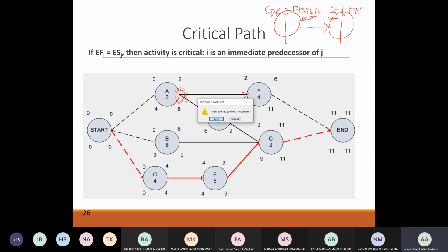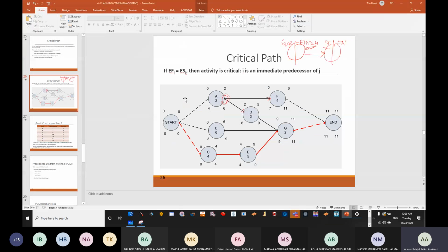So once again, there are two disadvantages of the ADM. One, that it does not allow you to have the gaps and overlaps, which is artificial, that we talked about for the weekend and the holidays, and that has been taken in the BDM, so it's an advantage for the BDM.